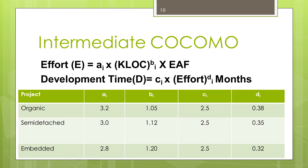The intermediate COCOMO estimation model is given by expressions for finding the effort and development time. The constants AI, BI, CI, DI are the constants for intermediate COCOMO — where I stands for intermediate. A new term, EAF (Effort Adjustment Factor), is introduced. The EAF can be calculated using the 15 cost drivers introduced in this intermediate COCOMO model.